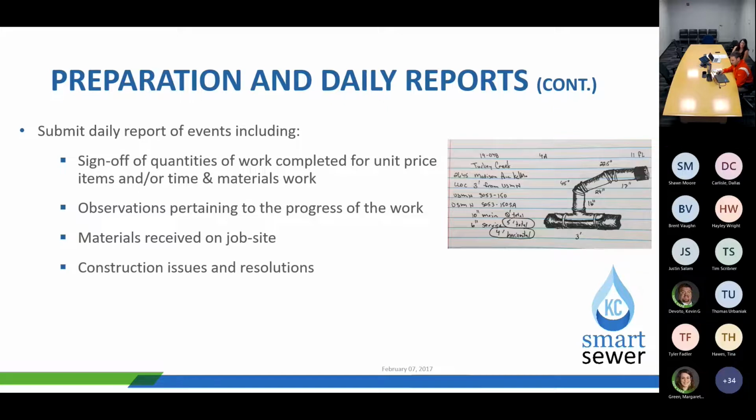When it comes to the importance of what comes up on the job, whatever might be an issue, for instance, hey, this gas main is going through biocell number 2. There was a resolution when Spire mentioned that the gas main was actually already encased with cast iron.